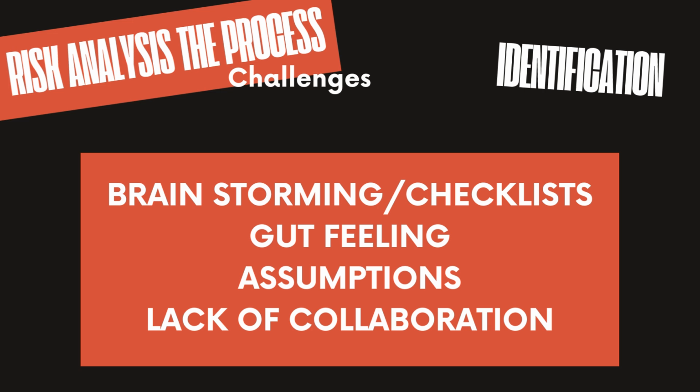If you don't dig deeper, you might completely miss the risk of regulatory compliance, which could cause major delays or fines. This is a classic case of naive risk identification, focusing on what's been true in the past without considering the unique circumstances of the present project.